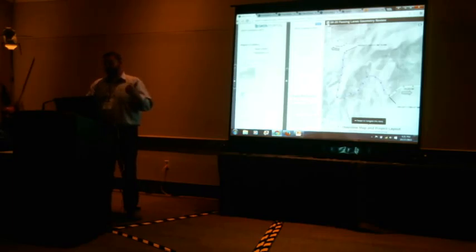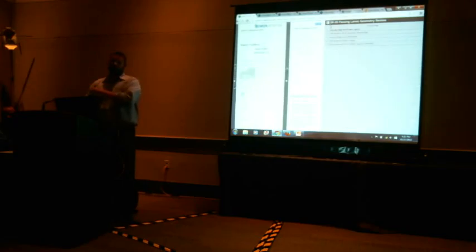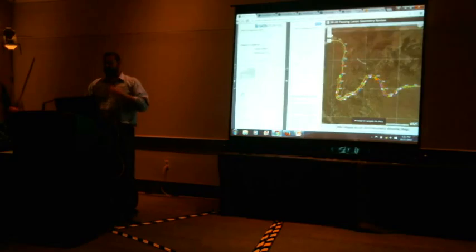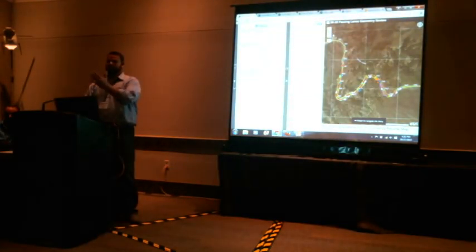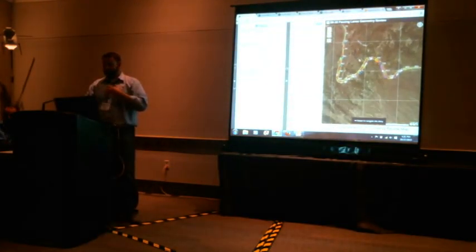So every milestone, there's the geometry review, plan in hand, PS&E, and final. And we're dumping data, CAD data, at each of those milestones. It's not just a one time and we're done. We want to be able to tell this story of this project from start to finish. And it's not for just us internal. We're doing it for you guys. We're doing it for the public, for everybody to look at.